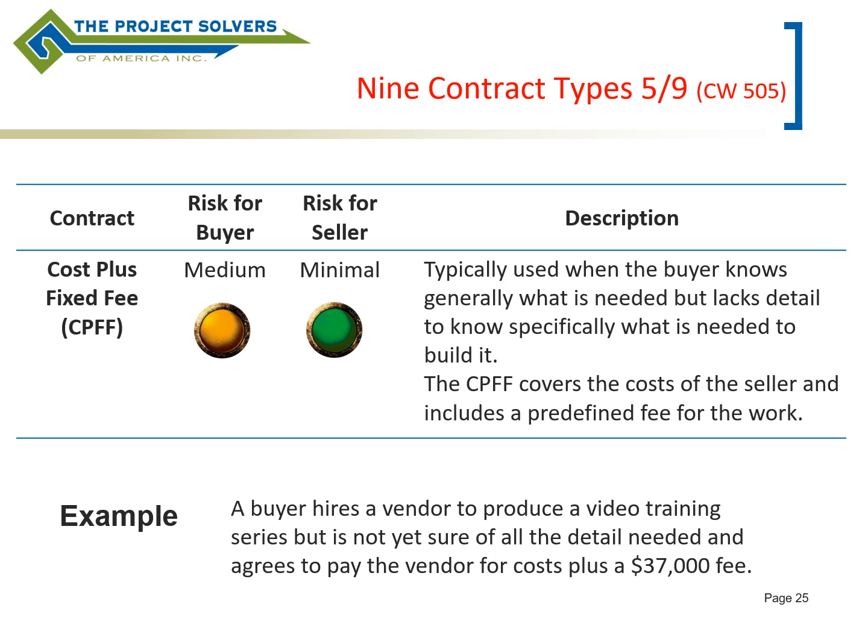That would mean that you don't have a very detailed scope of work built into the contract, because you may know at a very high level what you need, but you don't really know the details, and those details aren't important to you as long as the functionality is met. In that situation with that type of scope of work, PMI would say that a cost reimbursable or a cost plus contract would be very appropriate.